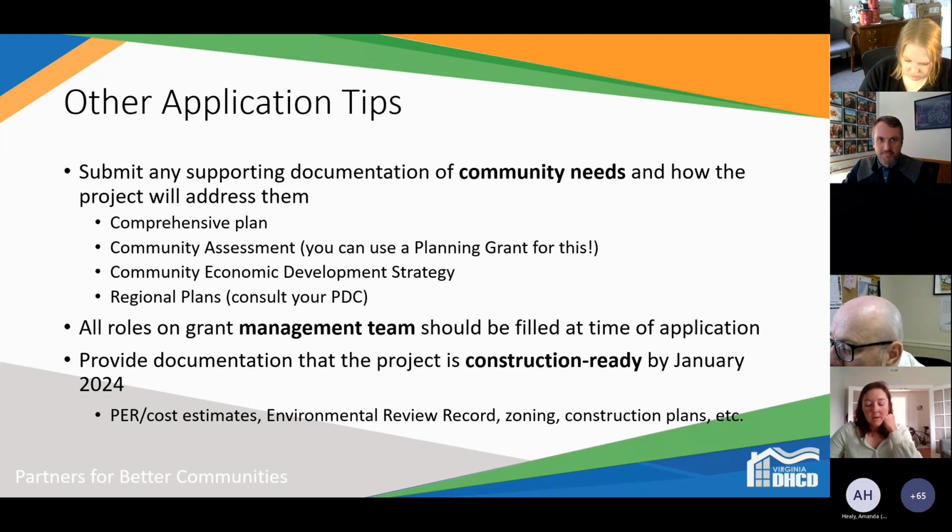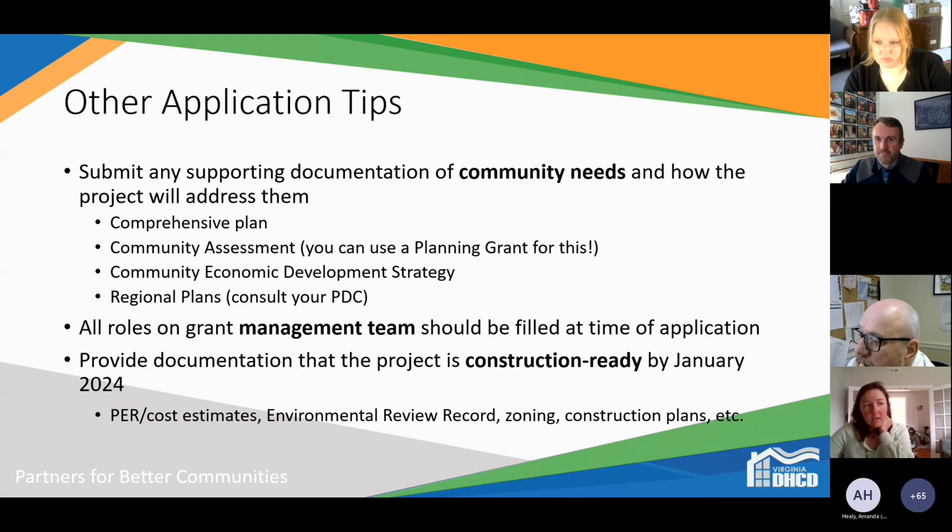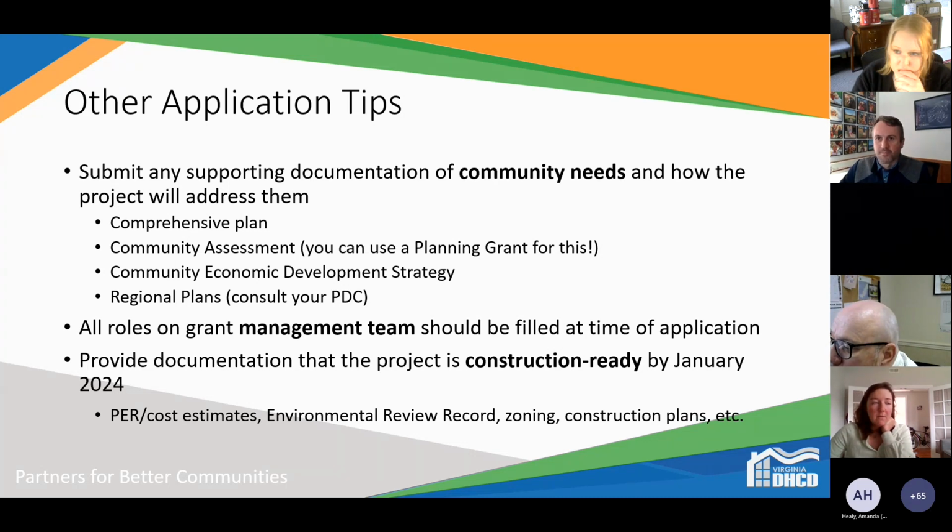So we look for how many obstacles prevent it from being construction ready. So easements, acquisition, environmental review record, zoning, PER, construction plans, all of these things play a role.